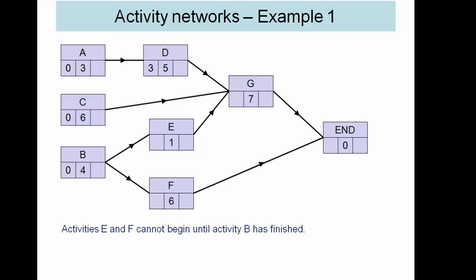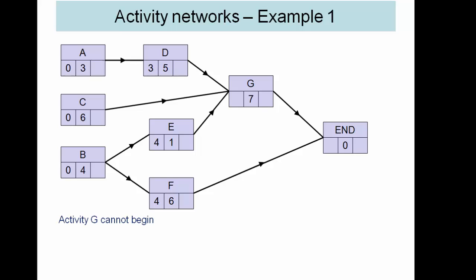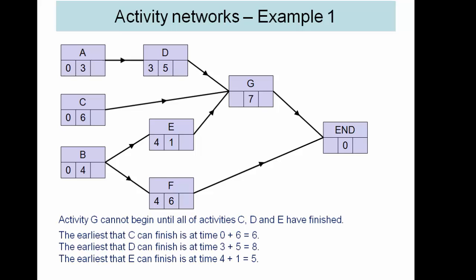E and F require B to finish so that will be the earliest time of four. G requires C, D and E to finish. So C finishes, the earliest C can finish at six. D requires both A and D so that's eight. E is five. So we take the latest of these because it requires all three to have completed.